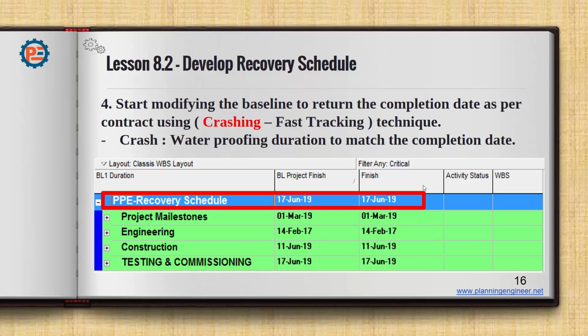And my final tip here, before submitting your recovery schedule, do update it, because it is not good at all to submit a recovery schedule and next week when you are doing a progress update you find yourself delayed. So in order to know if you are delayed or not, update your recovery schedule before sending it. See what the planned percentage is and what the actual percentage is.